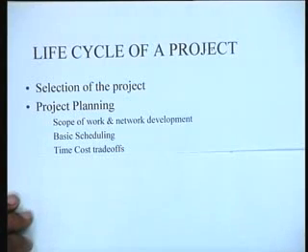When should what activity be done? Are there flexibilities in doing various activities? Things of this nature. And then there are issues of time cost trade-offs. That is, a project can normally be done within a year. Can we do it in 9 months instead by maybe putting in more resources, more money? These kinds of issues are answered in time cost trade-offs. They're very vital issues because quite often you might be interested in shortening projects by investing more money if it is worthwhile to do so.